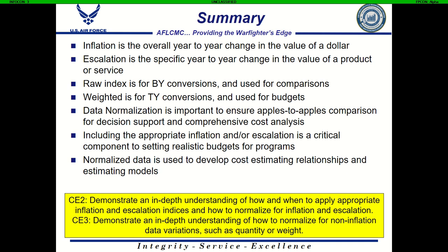Raw indexes are used for base year conversions, which is an important part of comparisons and doing cost analysis. Weighted indexes are part of the then year conversions in order to use those then year dollars for budgeting. We only budget in then year dollars.